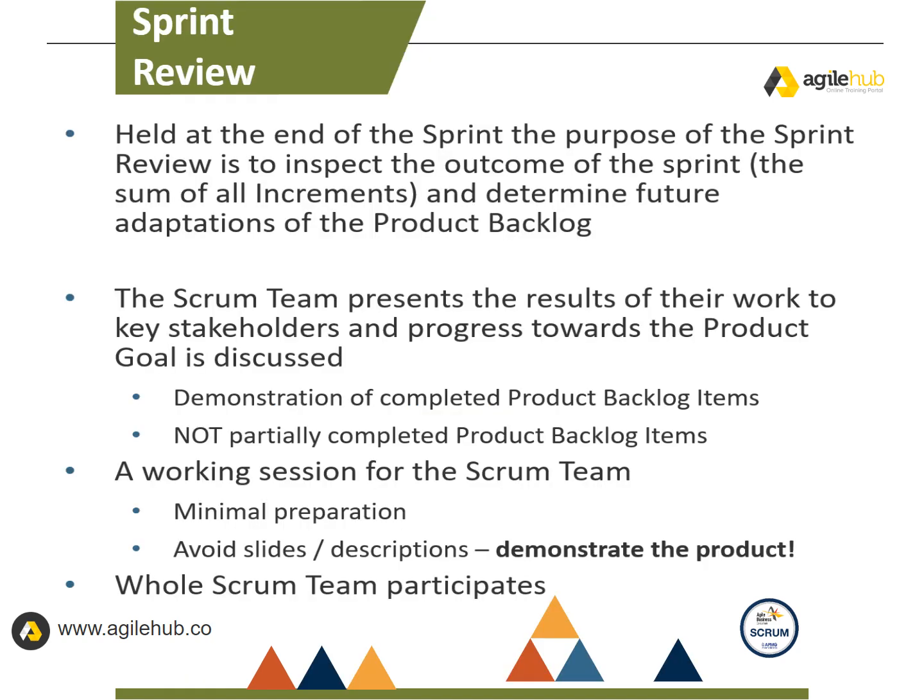The sprint review is held at the end of the sprint. The purpose of the sprint review is to inspect the outcome of the sprint, the sum of all increments, and determine future adaptations of the product backlog. The Scrum team presents the results of their work to key stakeholders, and progress towards the product goal is discussed.